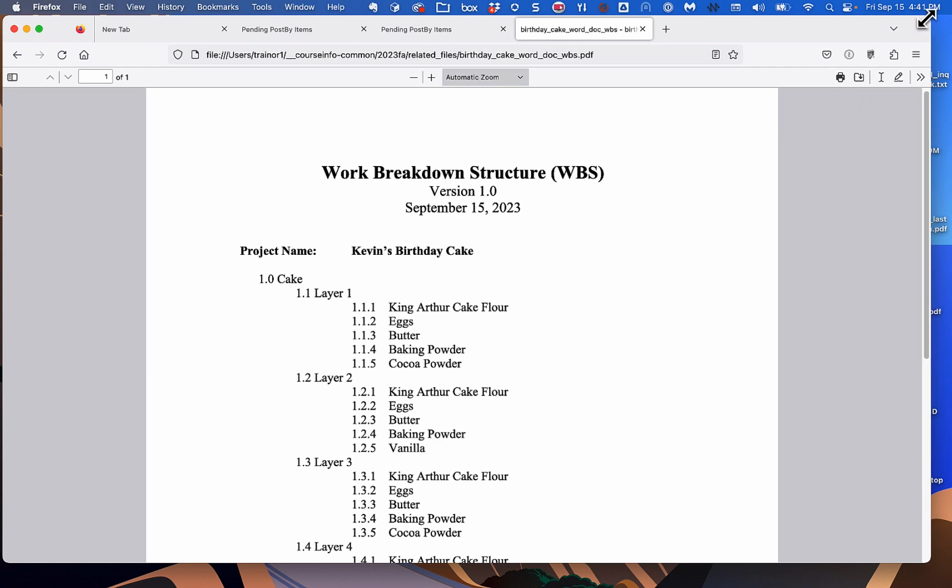So the WBS is an expression of scope. Okay. And I've mentioned in lectures, and Schwalbe mentions in her text, that some people believed for a while, although it's gone out of fashion, that a WBS is a statement of the scope plus it might be the beginning of the schedule because we might have a bunch of tasks in it.